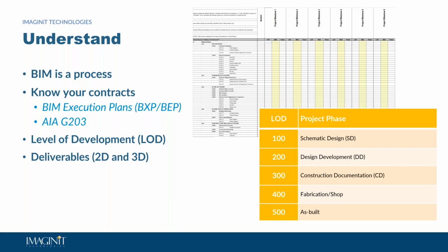But just to get an understanding of what the requirements of BIM are, you need to have a thorough investigation of what the industry standard of BIM is. And that can start with reviewing different BIM execution plans. So there are a lot of public entities out there that have their BIM execution plans released, so you can review them, see what types of requirements different universities have for BIM. Really everything that I've ever reviewed is roughly based off of, or very closely based off of, AIA documentation.